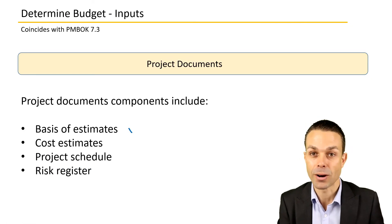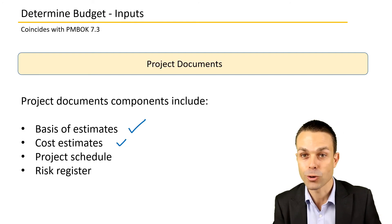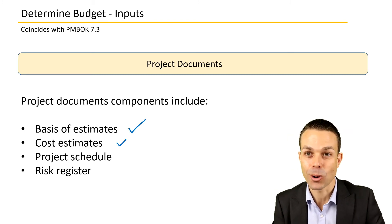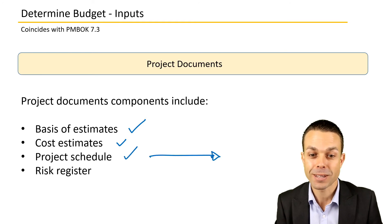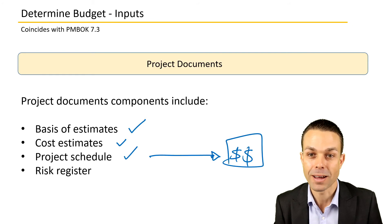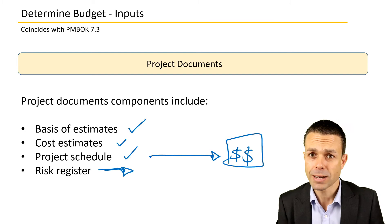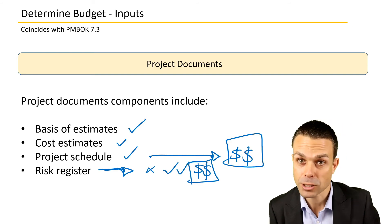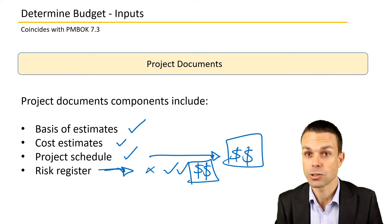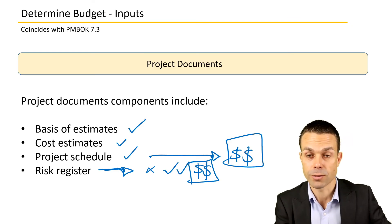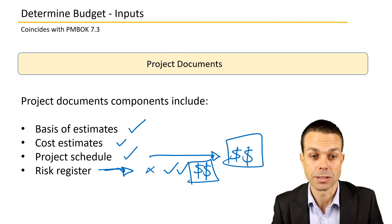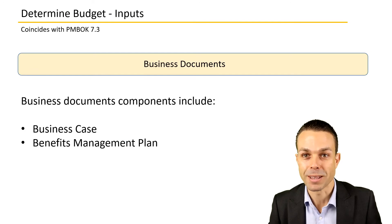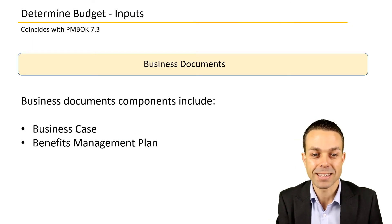Project documents are also an input: we have the basis of our estimates and the cost estimates themselves, developed through analogous or parametric estimating techniques. The project schedule tells us how long we'll be needing resources, which determines the money involved. Our risk register tells us whether we need to avoid certain risks or call out additional ones — cost-based risks like currency fluctuations, hedging requirements, country differences, union requirements, or specific hour constraints — all of which are inputs for determining the budget.